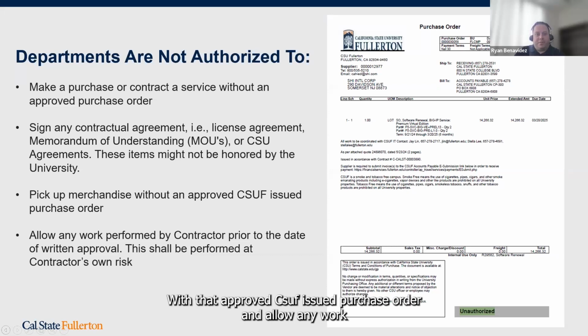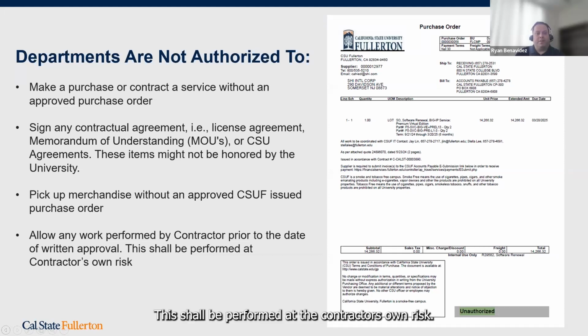Do not pick up merchandise without an approved CSUF issued purchase order, and do not allow any work to be performed by a contractor prior to the date of written approval. This shall be performed at the contractor's own risk if this were to happen.